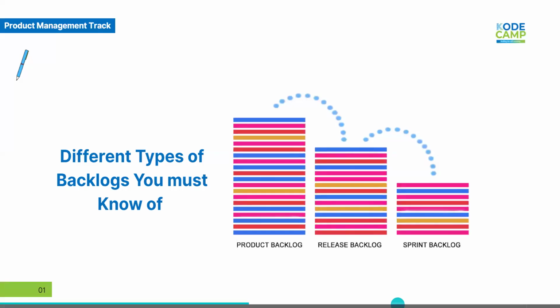In phase 2, users can send money across borders in West Africa. Then in phase 3, you introduce new payment methods like cards, mobile money, bank accounts, and so on. Then phase 4, you add user wallets, savings, and spending analytics. After that, you move into phase 5, which is open API for businesses and agents.